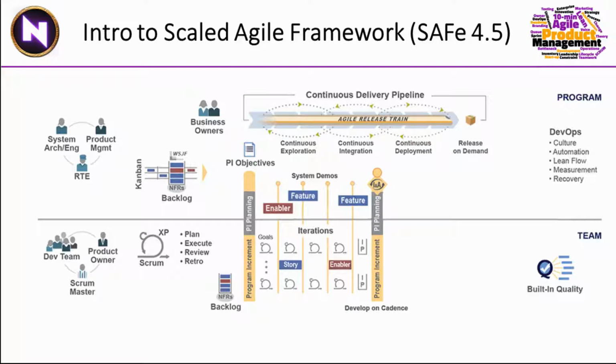We can't have teams working 9 or 10 weeks by themselves and after that committing code into a common repository. There is no way that's going to work. They need to continuously integrate into the same code base so that anyone everywhere can use the features as they're being built, and any misses or constraints can be identified early and often. Of course, also continuous deployment. We need to get these features tested and done and put into production and then released with toggle switches on demand when needed. That is that part.